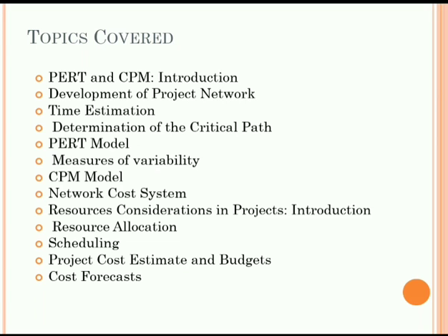The input for this will be project management plan, activity resource requirements, then enterprise environmental factors and organizational process assets. All these things will be given as the input for the purpose of developing the human resource plan.